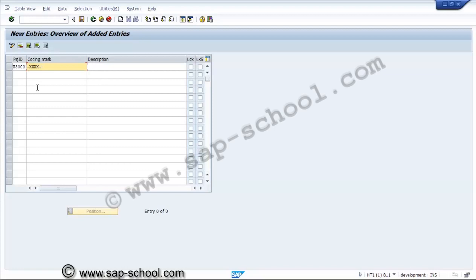In the next level, we can consider which type of asset we are using this project for. That means this project component can be for any asset, like the mechanical type, electrical, civil nature, or pre-operative. It can be anything. To differentiate the equipment package, we can keep one more character, like we are keeping here 1 character for entering the asset type.